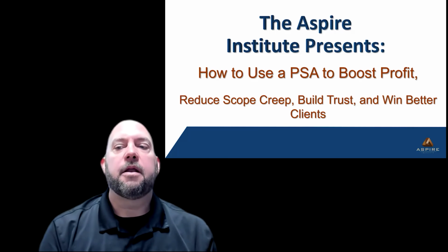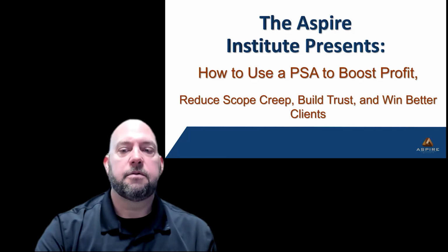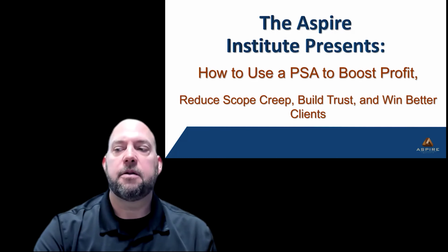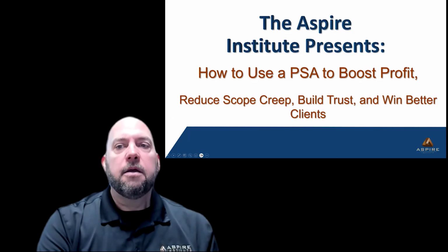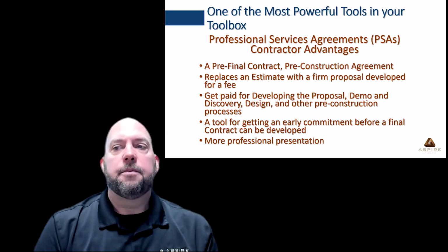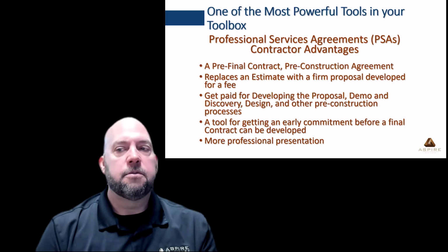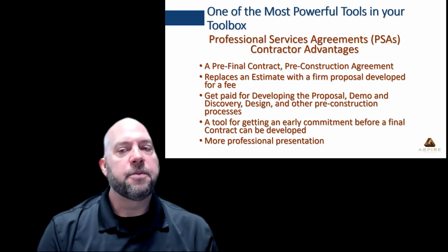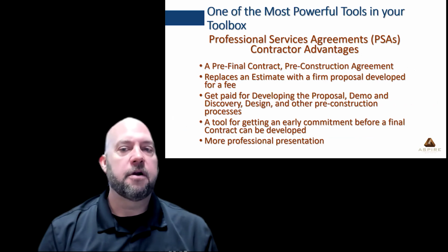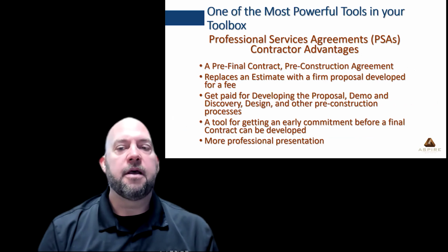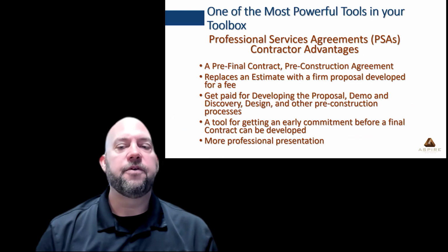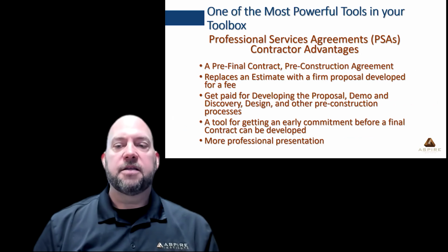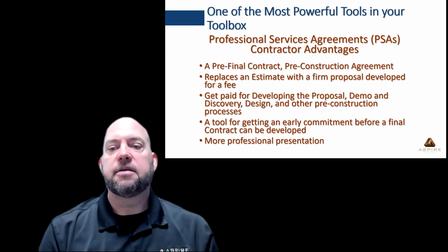Today I want to talk about how to use a PSA to boost your profit, reduce your scope creep, build trust, and win better clients. Kind of all ties together. So to understand a PSA, it's one of the most valuable tools you can have in your toolbox, and it's a professional services agreement. That's what PSA stands for, and it's an advantage for contractors. It gives you the ability to have a pre-final contract or pre-construction agreement. It replaces the estimate with a firm proposed development for a fee, and it gets you paid for developing the process through the estimating and development process.